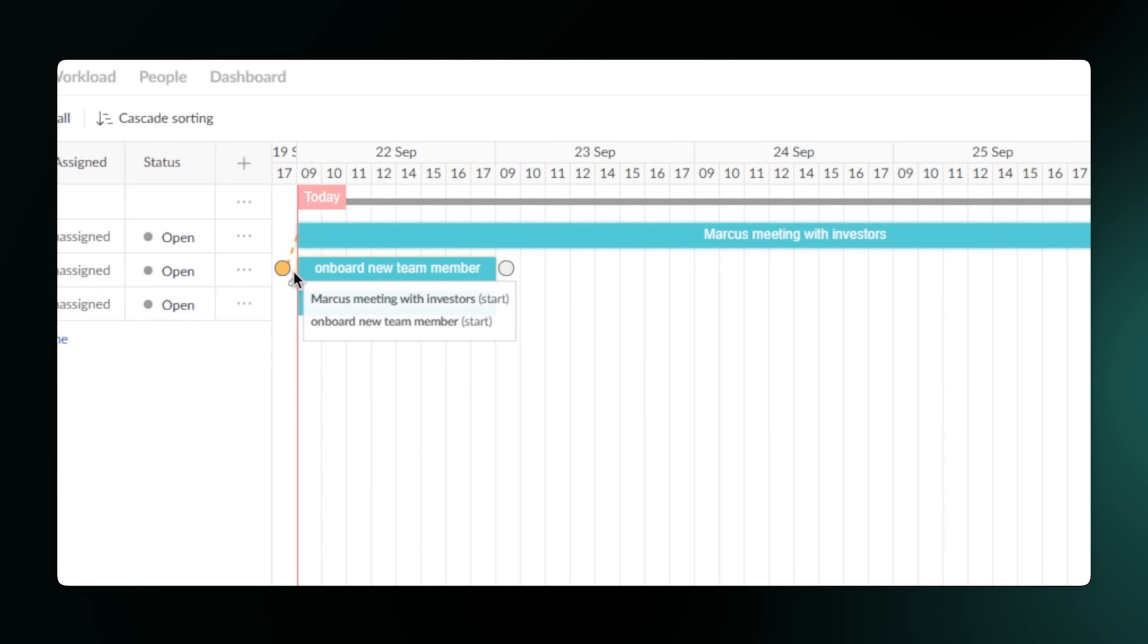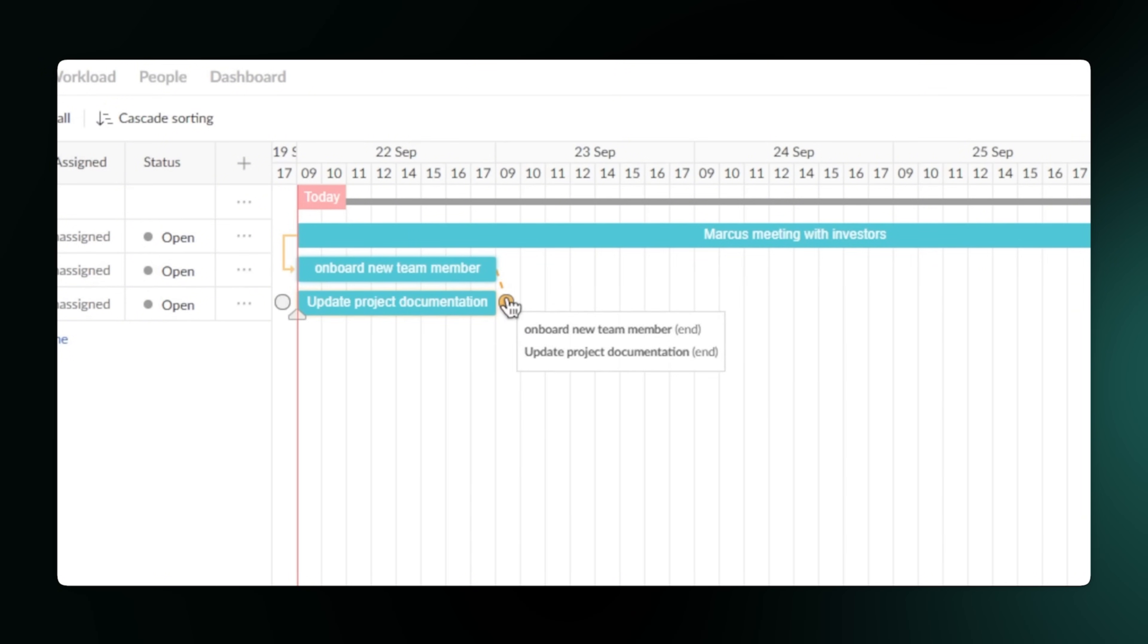See this? You can draw a line from one task to the next. This creates a dependency, which means you can't start the second task until the first one is finished. This is huge because it helps you see a clear project timeline and prevents things from getting out of order.